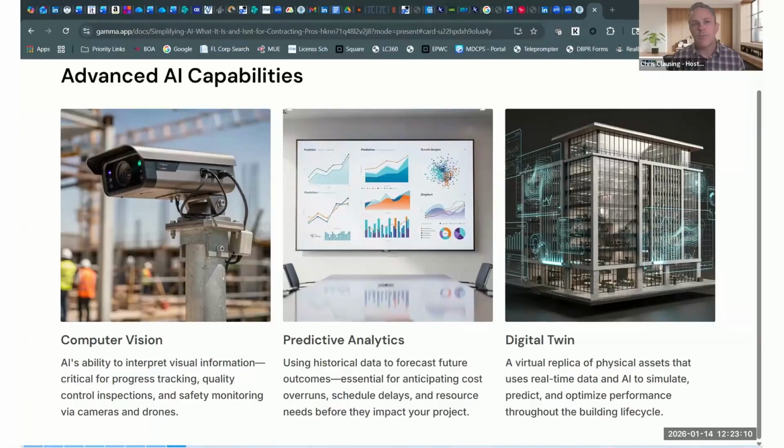I know it's not necessarily for road work and bridge work so much, but when I was scanning, you could scan projects. Let's say you're doing a renovation of a building or a new build, and you did a digital twin, you had scanning, you came in, let's say every month, and got a new scan. You could actually see through the digital twin the progress of the project. You could find where pipes or wires or different components are covered up by drywall or concealed, you can actually see them now, in real time through the digital twin. You can see, okay, what's behind that wall is this, without having to break that open. So I love the idea of digital twin as well.